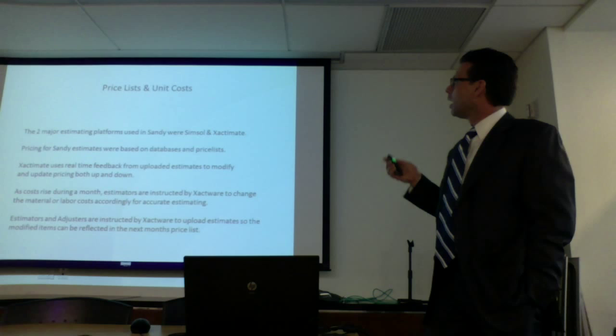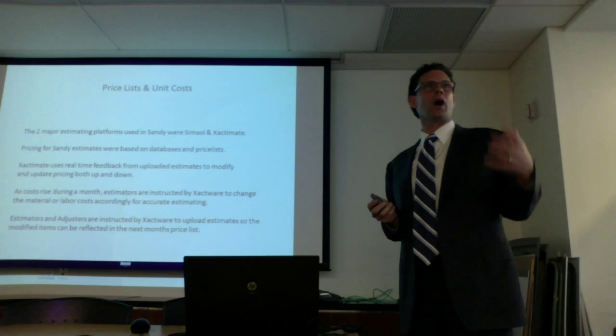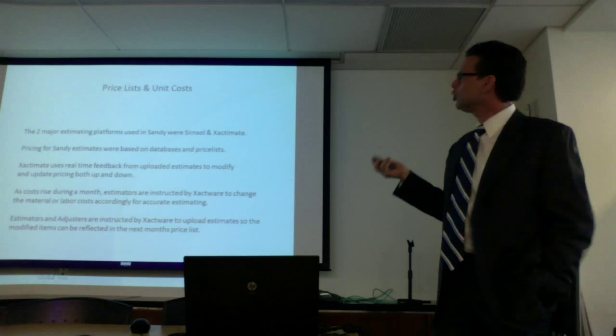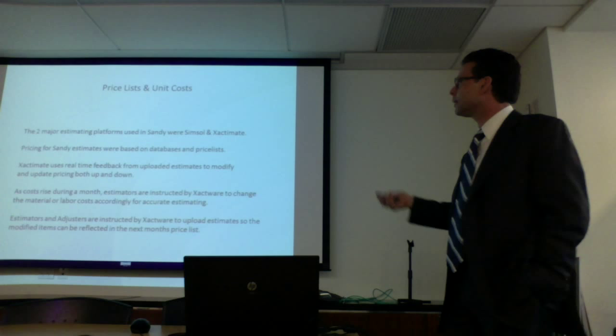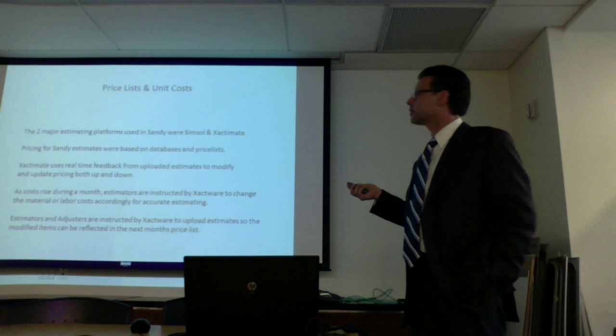I'm going to go through a very quick overview of unit costs, why they're bad, why they didn't change, and why what you see in an estimate was just not enough to do the work. Two major estimating platforms used in Sandy were SimSol and Xactimate. Pricing for Sandy estimates was based on databases and price lists. I'm going to use Xactimate as an example. Xactimate uses real-time feedback from uploaded estimates to change price lists.